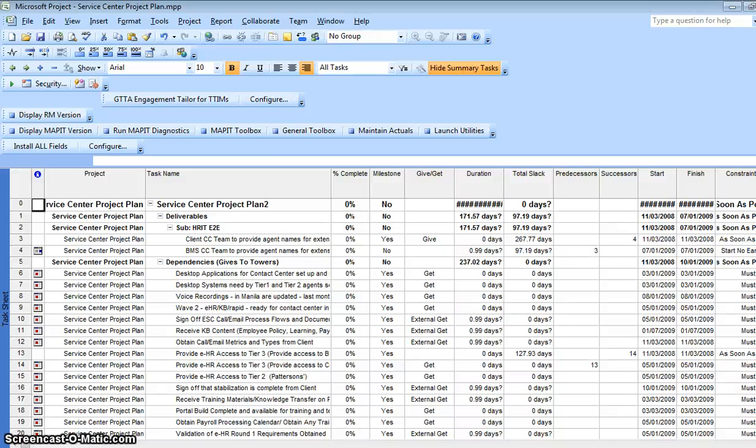This is a demonstration of MapIt 6.0, which is a desktop application that runs under Windows 7 and can connect to or launch Microsoft Project plans so that you can then run analytics and identify defects within the project plan. The purpose is to run our 8-step methodology and to clean up a project plan to the point that you can capture a solid baseline, and then from that point you can generate all sorts of reports and graphs that show how well you're progressing against the baseline.